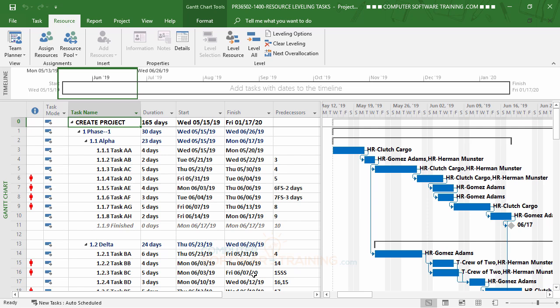What it allows us to do is fix overallocation, not by reducing hours or anything like that, but rather by either extending the length of certain tasks or shifting an entire task further into the future so that no longer do we have an overlap. This can be quite devastating to the project ending, as far as how long it takes to end, when that date would be.